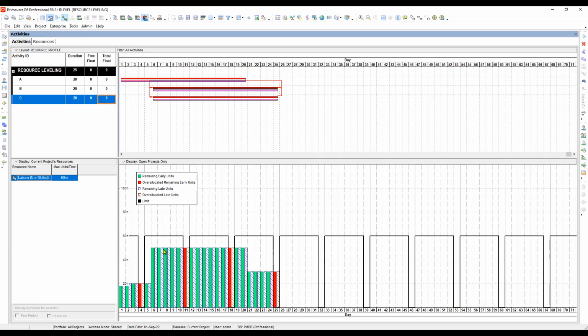It is because there is no over allocation that the leveling in Primavera will be working on. So that means Primavera will affect the leveling process only when there is an over allocation. Other than that, you have to do the alternative solution.